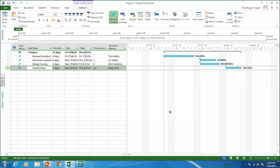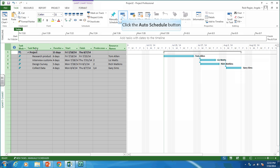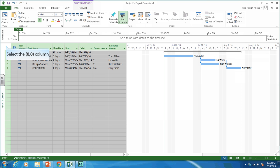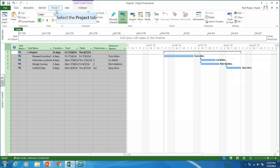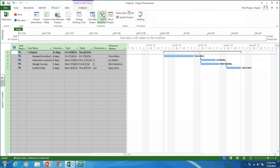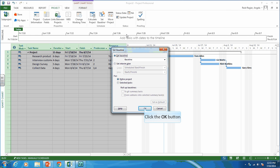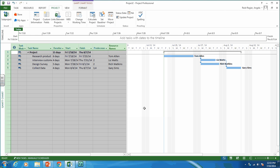Now the assignment asks us to put in status — a percent complete. But before you do that, you should always auto-schedule and baseline your project. Let's auto-schedule it first to make sure everything's good. Now let's baseline the project: go to the project tab, set baseline, set baseline. That takes a picture of our plan and everything else will be measured against it. Now we can add status.